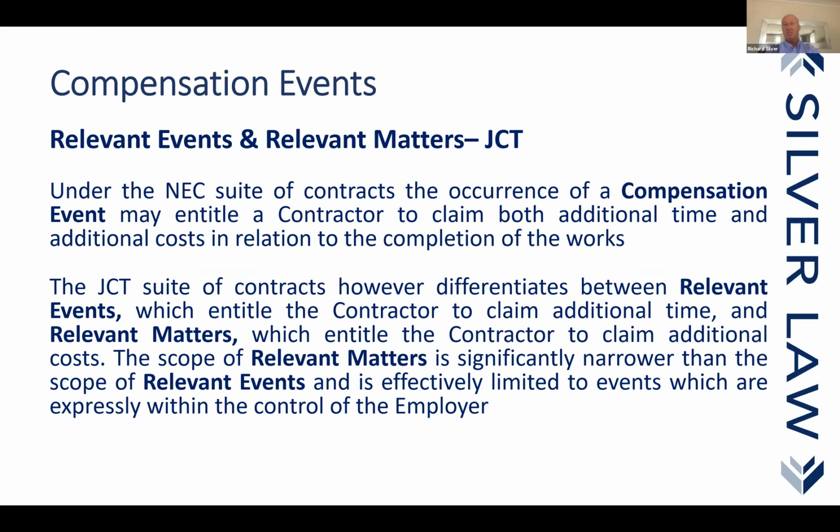There is provision for the submission of quotations and acceptance by the architect, CA, project manager, employer's agent. But occasionally it works, but more often variations are valued after the event on the basis of a fair value. And you quite often find when the final account comes about, the contractor will have 60% of the values agreed. There is agreement as to whether or not they are variations and how you're going to value them. If there is a dispute, you're getting involved in fair values, not really into contractual entitlement and obligations, but just simply is it a variation or what's a fair value? Unlike NEC, we're going to get into much wider arguments.